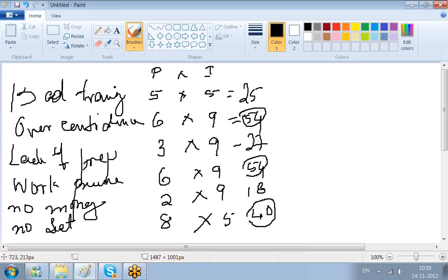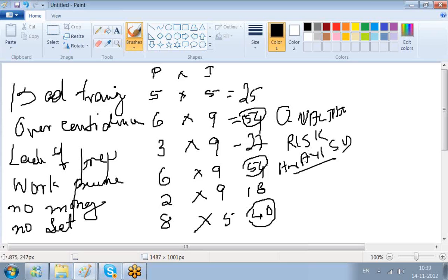Now this process of filtering, we call it qualitative risk analysis. So this is a filtering out. You come out with the risk register, then you rank it based on probability and impact, multiply, then apply a cutoff factor, which is a threshold, and that whole process we call qualitative risk analysis.